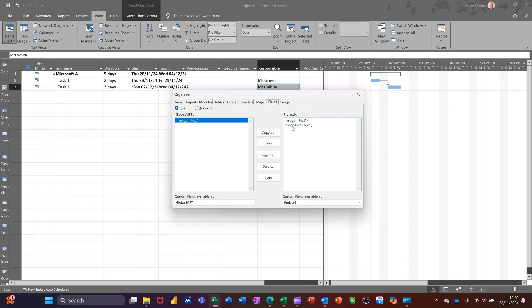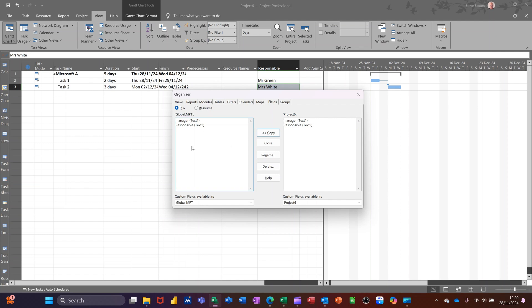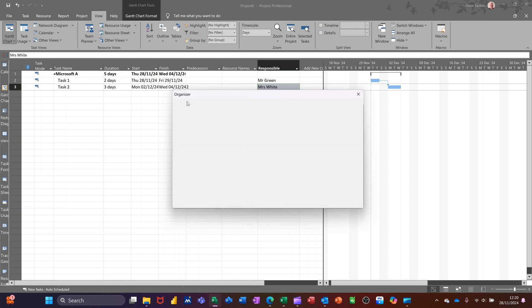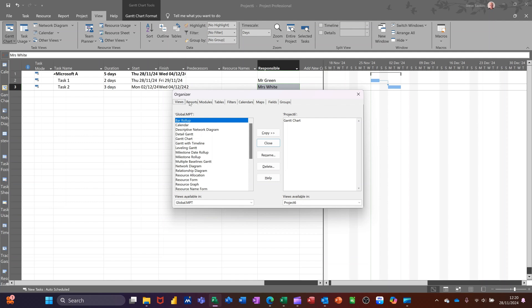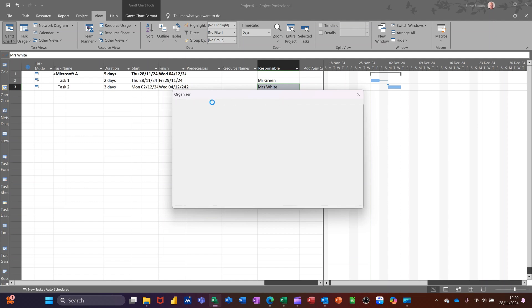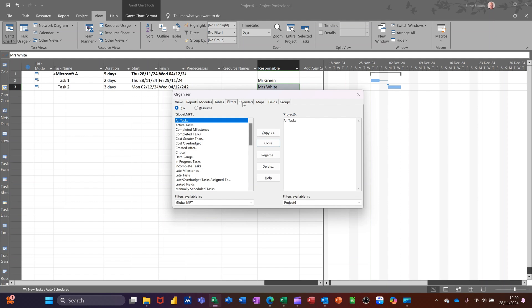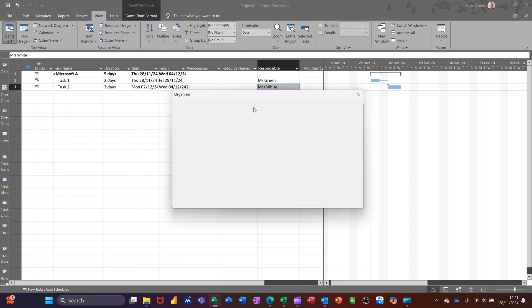Then I can see responsible. You can see that I've already got that other one, manager, across there. So I'll copy that across into the global template and then that will be available in all new projects. And you can do that for views, reports, all of these.